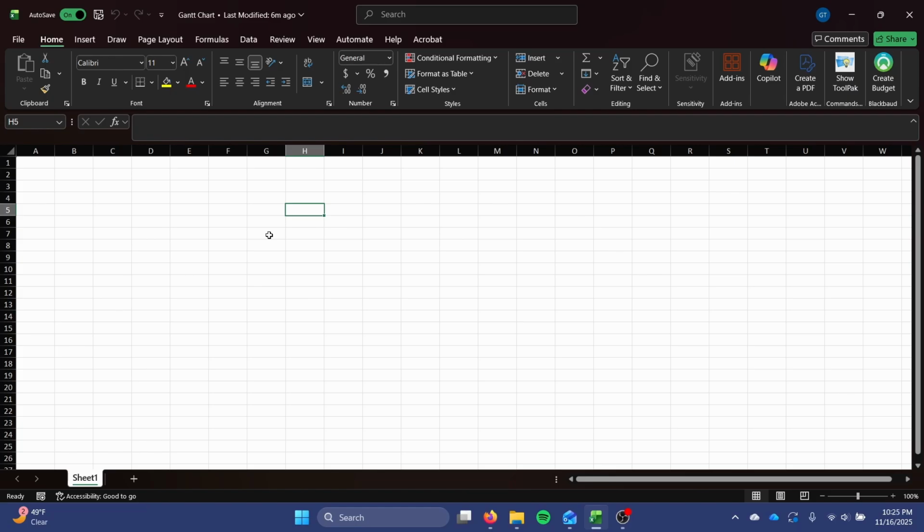And one important concept of a Gantt chart that we won't be covering in this tutorial is the concept of critical path. So the critical path of a project is essentially what governs the project's completion. There are normally multiple tasks going on at once. For example, on a regular building site, it is very common for the people who are doing steel erection to be working alongside the people doing some electrical work and the people doing some of the site civil work. All of that happens at the same time.